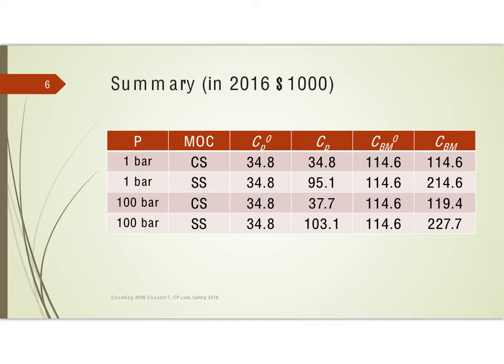To install it, I'm going to do the similar calculations. And again, you're going to see that the base price to install a carbon steel 100 square meter, in 2016, $115,000, $119,000 if I have a higher pressure. For the stainless steel, $215,000 or $228,000 depending on the pressure.